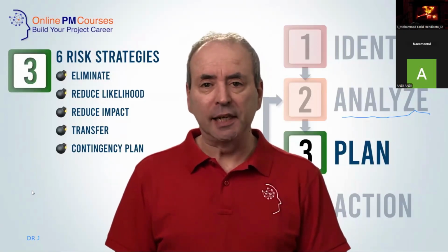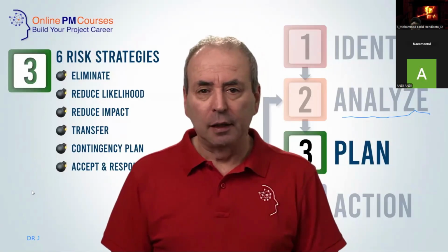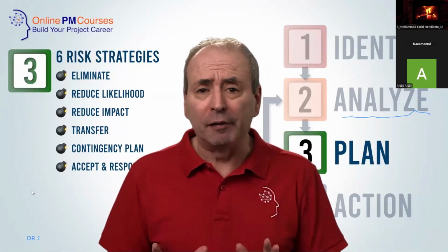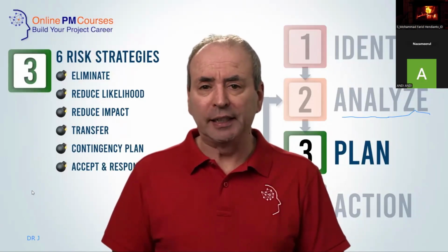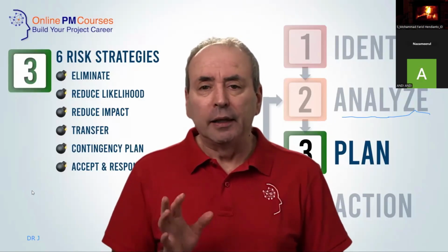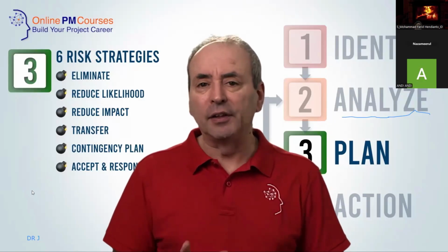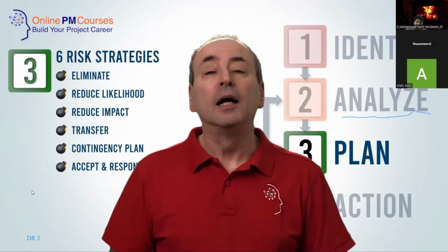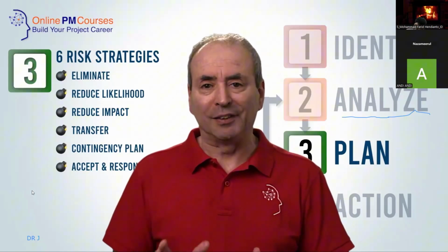And the 6th strategy is to accept the risk. If the risk is not very large, if it's not very serious, if it's not very likely, then you may consider that none of the other strategies are cost effective and to accept the risk and deal with it if it occurs.